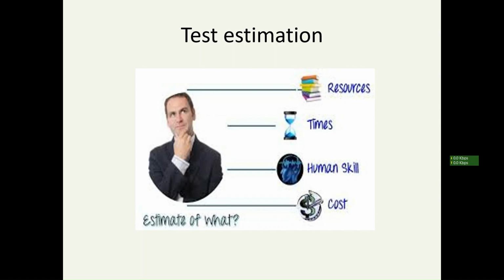For how many scenarios, roughly how many test cases will come, and what are the simple, medium, and complex test cases, which ones are going manual, which ones are going automation, and for automation which tool, open source tool or license tool, and for manual how you are going to write, Excel sheet or any management tool, and whether any cost is needed. How you are going to release it, what pipelines you are going to set. Like that they are going to estimate the budget, time, and the cost.